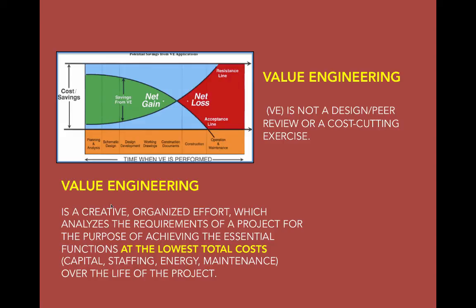So the cost saving exercises really work best up here in this phase of the work. And you can see as you get into construction documents and this end of the project that the gains you get from value engineering and cost cutting are reduced dramatically. The reason is that once you're in construction, you've already signed a contract, so you're actually trying to save costs while you're building.